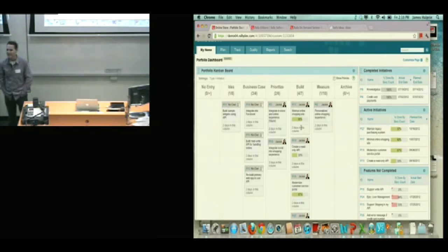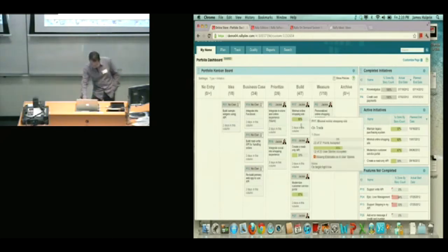So that's percent completed of... Yep. Because we sometimes don't plan what we're going to do 3 or 4 iterations ahead. We just plan an iteration ahead, but we might have a 4-month body of work. So do you still get clarity into progress? Yeah, I think that's a great question. So what this is saying is we're 60% complete through the stories that we've broken out and understand at the moment.